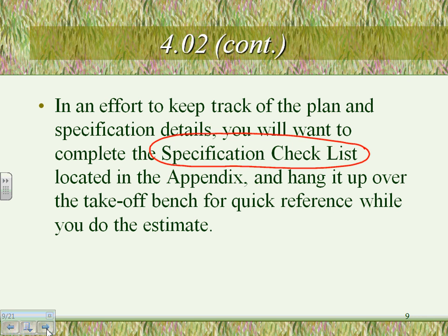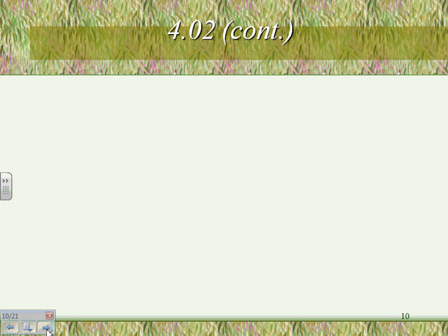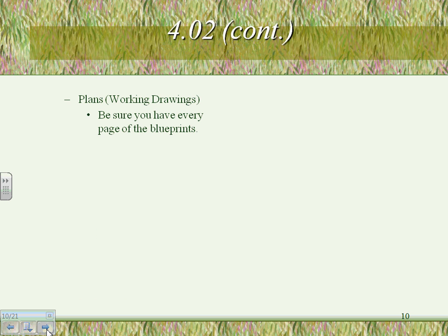The minute that you put a check, this means when you're done with your estimate, you look at it and say, you know what, there's an issue with job factors. There's an issue, so I might have to jack up my prices slightly or lower them. Overtime, remodeling, and a whole lot of lists, guys, come into this job list. And here are a few of them.